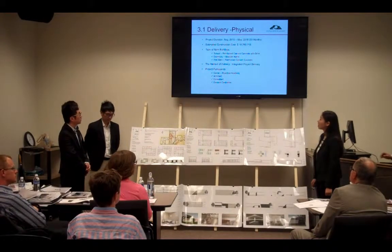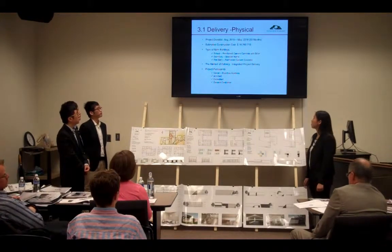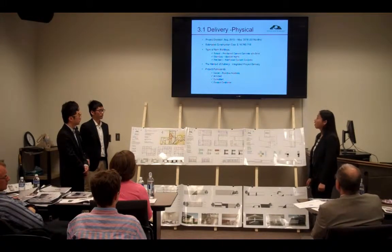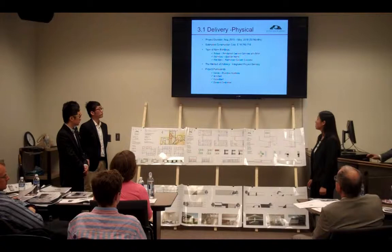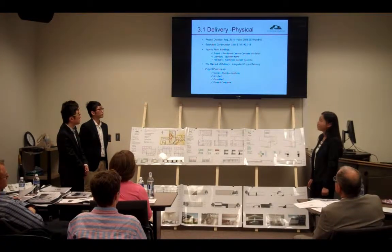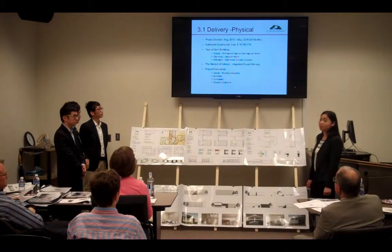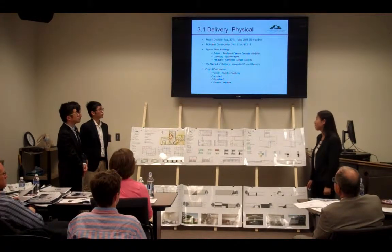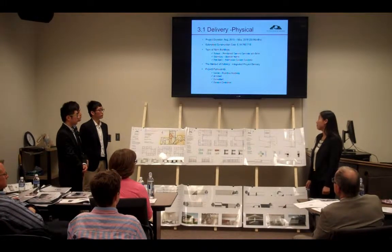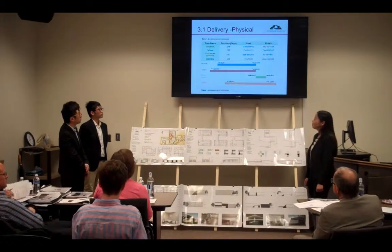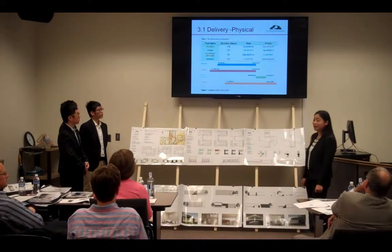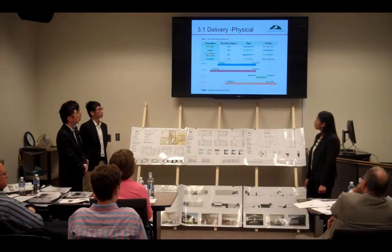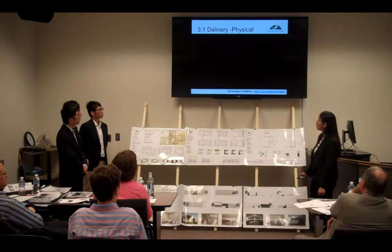Let's review the basic information for our project. The project duration is supposed to be 33 months, starting August 2015 to May 2018. The estimated construction cost will be nearly $90 million. There will be three main buildings on site: the school, the dormitory, and the red barn. The delivery method of our project is IPD, so all participants were involved in the project from the pre-design phase to project closeout. Because of the unique design method, we will have only one construction staging, which will last 22 months, including the remodeling of the clubhouse.